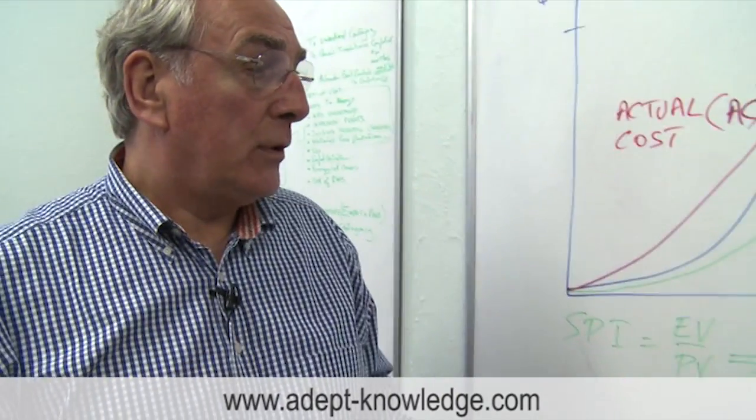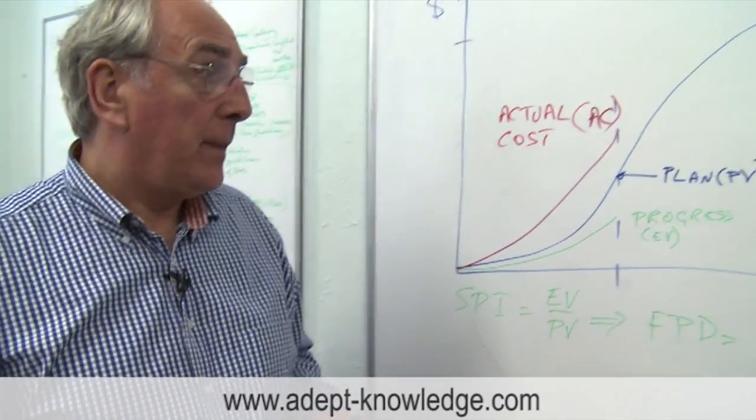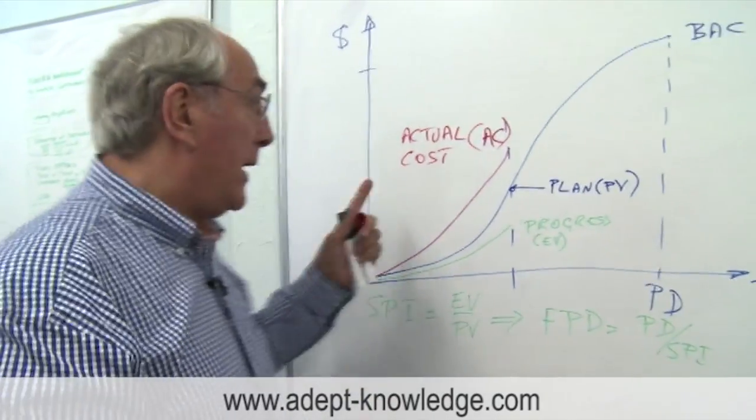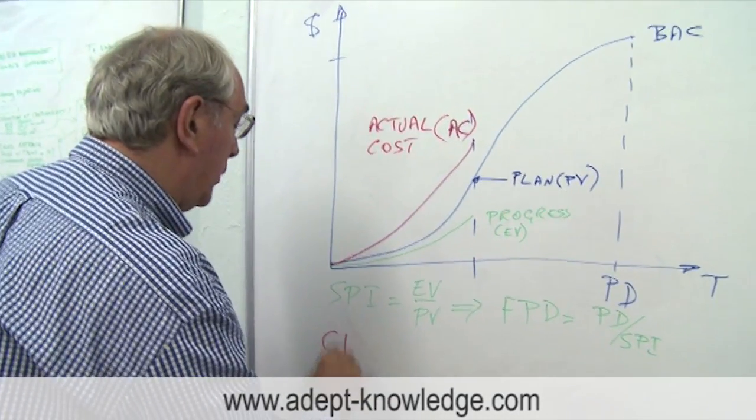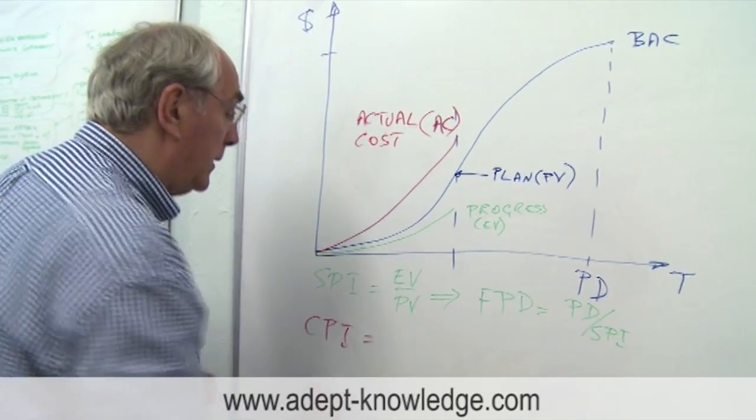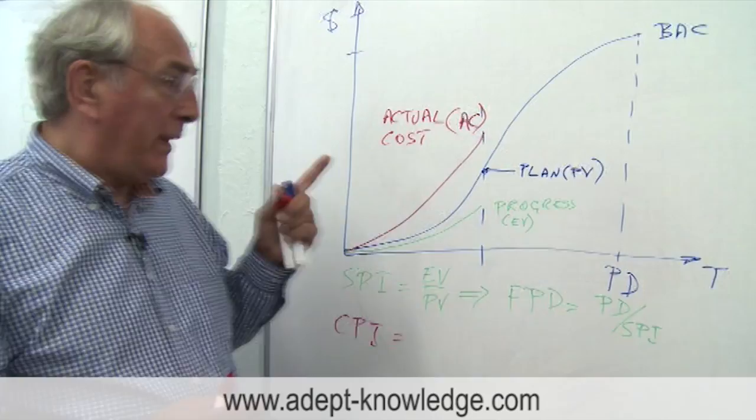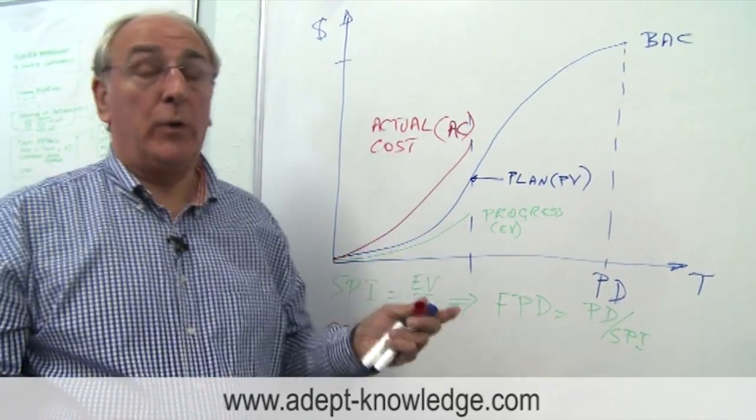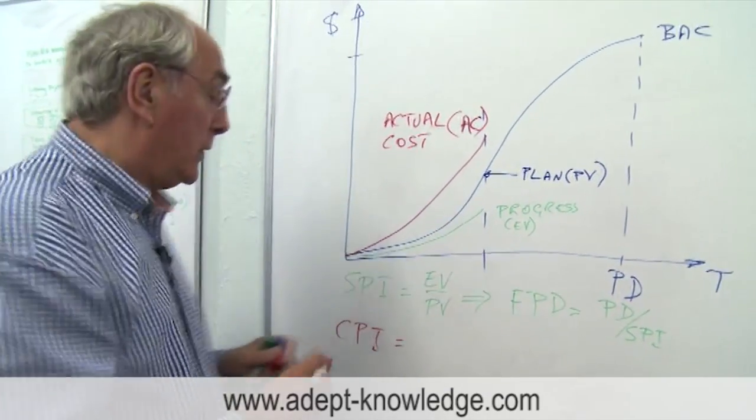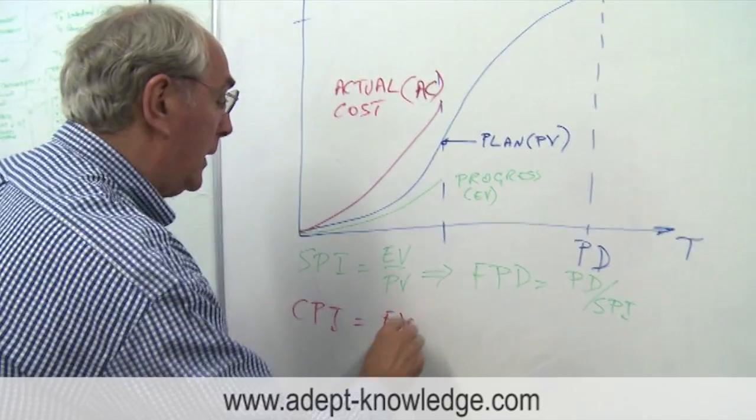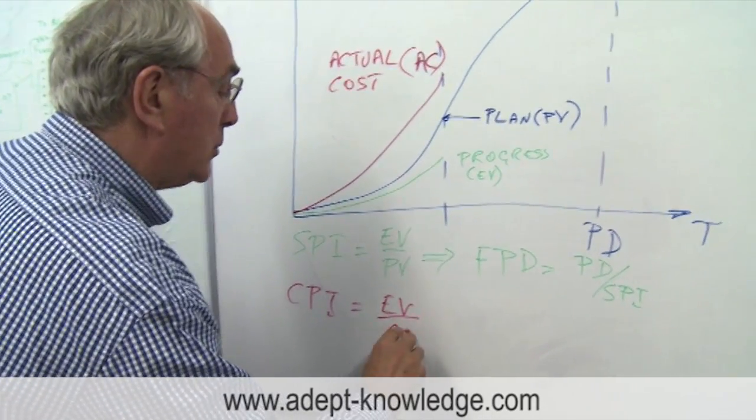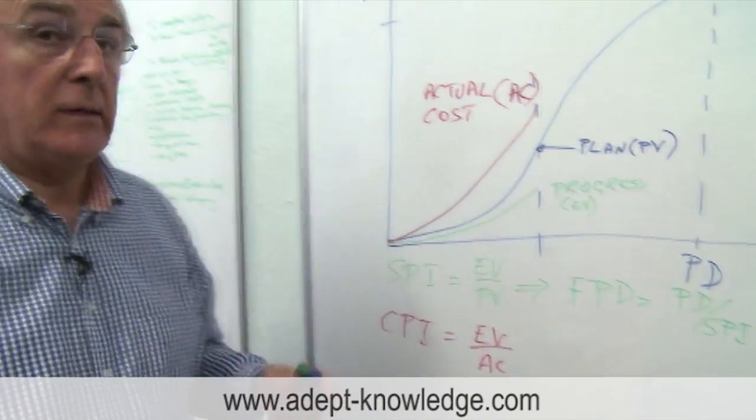So we can now measure what I talked about as being the cost performance index. That cost performance index, some people call productivity or efficiency, and what we're saying is what did we get for what we spent? Well what we got was the earned value. So that's our earned value divided by our actual cost. That's our efficiency or productivity.